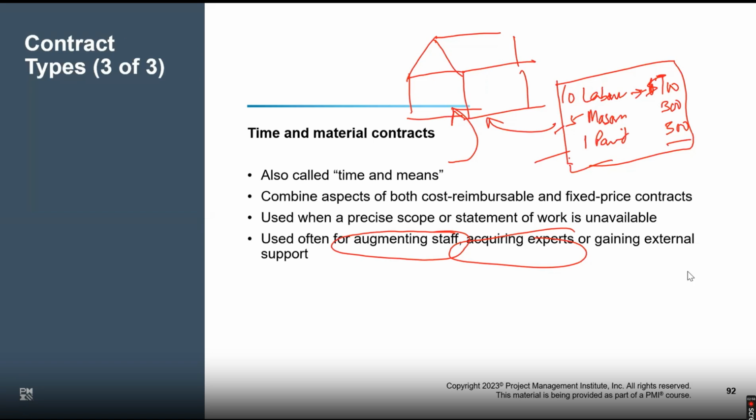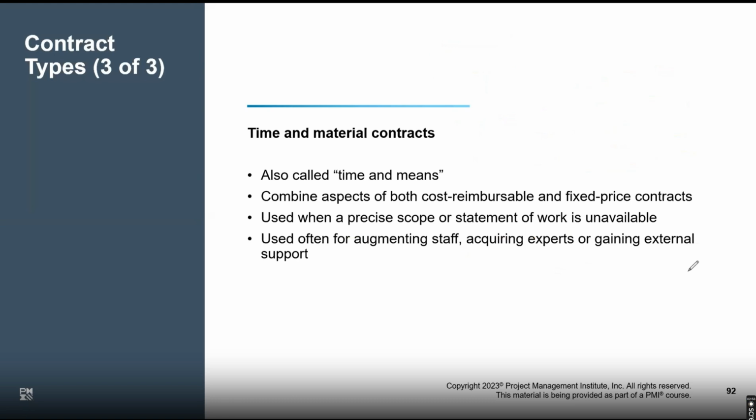It works fine because across the globe, whenever we talk about T&M, in Agile also we use T&M. In Agile also there is a contract which is based on time and material. This is the last one you will see there also. Because there also, my rate card will not have a labor. My rate card would have a designer, developer, tester. There's a price for a designer with 5 years experience, a designer with 3 years experience, a designer who is a fresher. You will have a rate card and you choose, like a buffet meal, and you create your own meal out of that. So you decide what you want. That is going to be the kind of contract we'll get in.